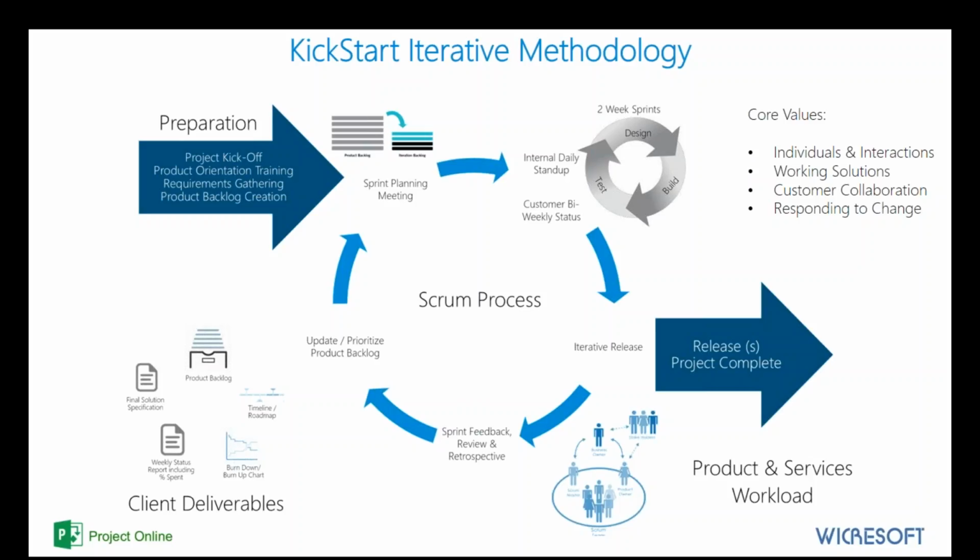The key here is if we're delivering incrementally, we can respond to change. One of the things we find is that people's needs or perceptions of their requirements change over the course of an implementation. An idea that you may have had at the outset on how to deploy this might change midway through your deployment, or maybe even after you go into production. The idea is to make this as incremental as possible so that you can respond to change, making sure that what you're delivering to your internal customers is ultimately the current perception of what the requirements are, and not what it was back when we did a detailed requirements analysis.